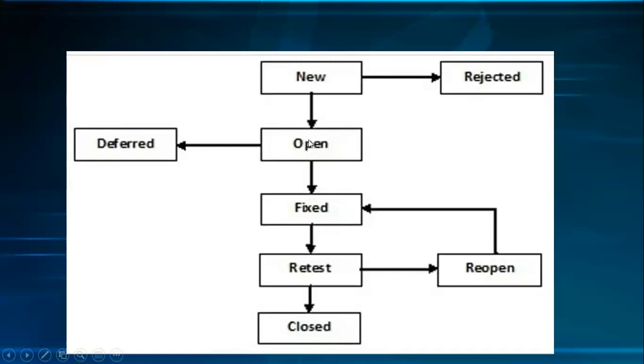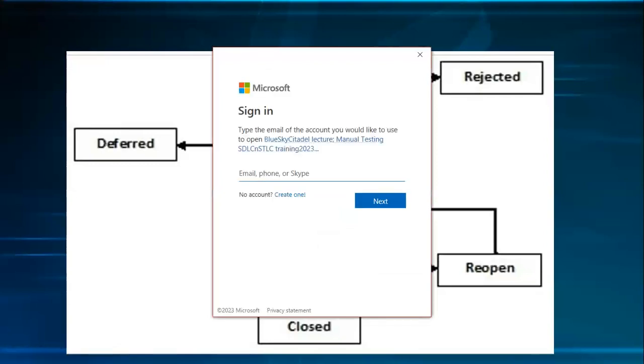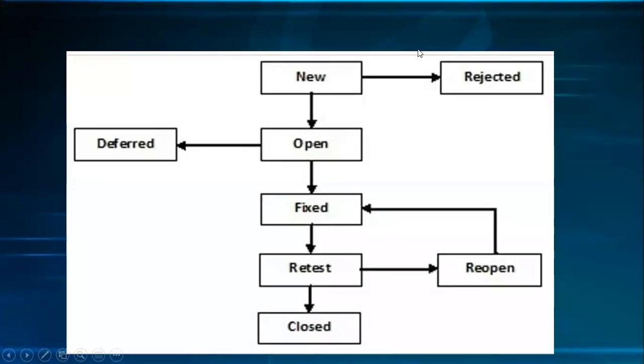After the new, there's a defect triage. What does defect triage mean? It means we come together as a development team. When all these defects are raised in the morning, we have a defect triage session. That session will say 25 bugs were raised. User unable to log in. Details are there. They would have seen it. Is this a bug? The developers will say, "Oh yes, we know there's a possibility that there's an issue. We can fix it." Then the state is changed from new to open or active.